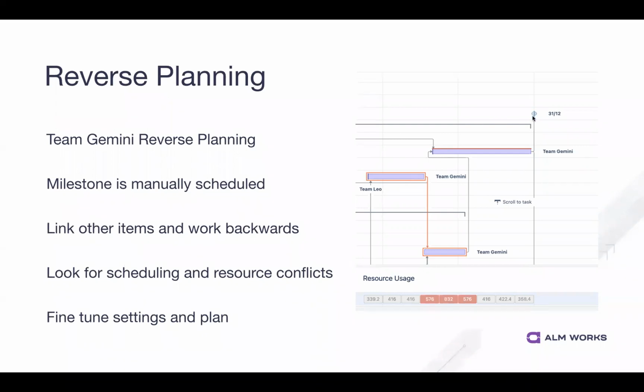Now, of course, there's different things that we could do. From the Gantt side of things, we might increase capacity, which will make these red boxes disappear, but doesn't really solve any of our problems, unless we can do something corresponding in the real world and add additional resources to try to pick up that slack.